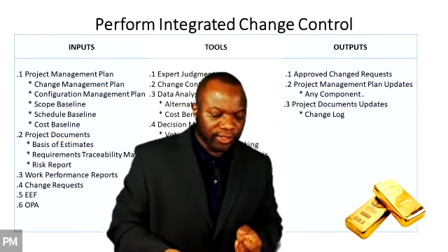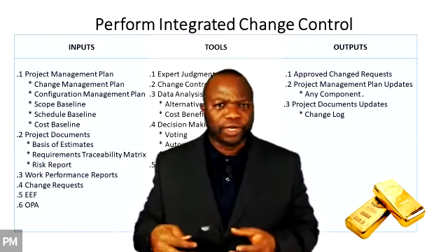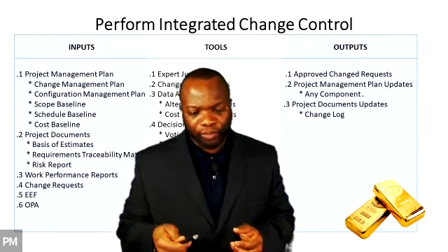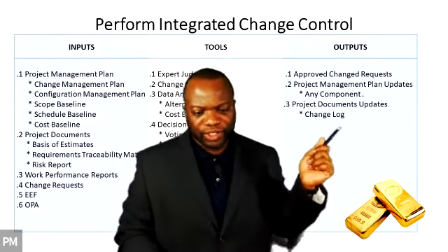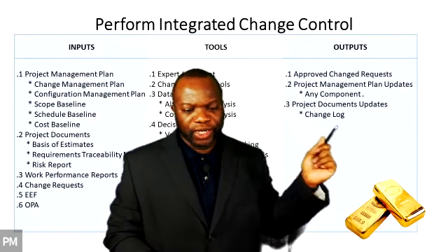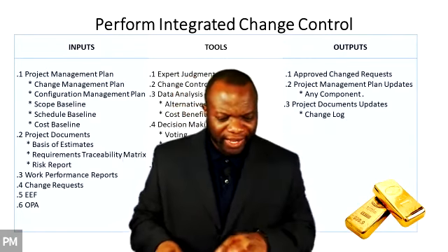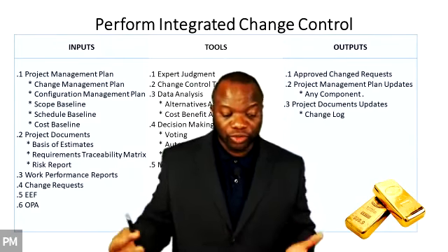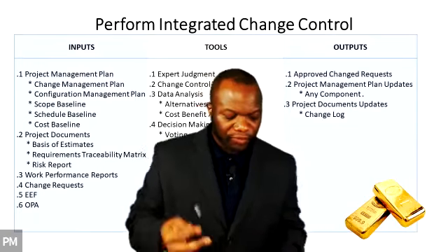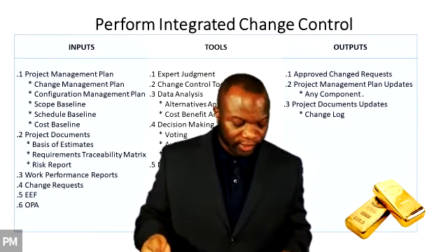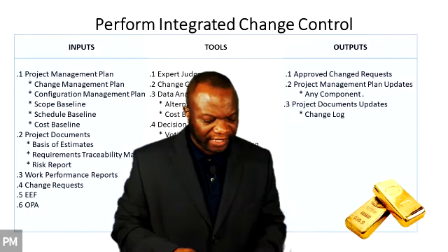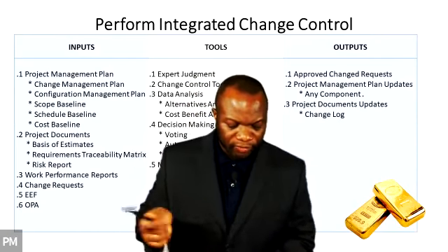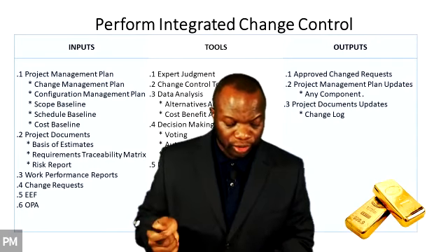In other words, this tool could serve as a kind of log. So when you see the output here that we have as change log, bear in mind that your change log in many an instance actually exists as part of this system, this change control tool that we're talking about. And remember my example of change point. Now let's go back to page 118, a few important things. So steps in configuration management that this tool should do.